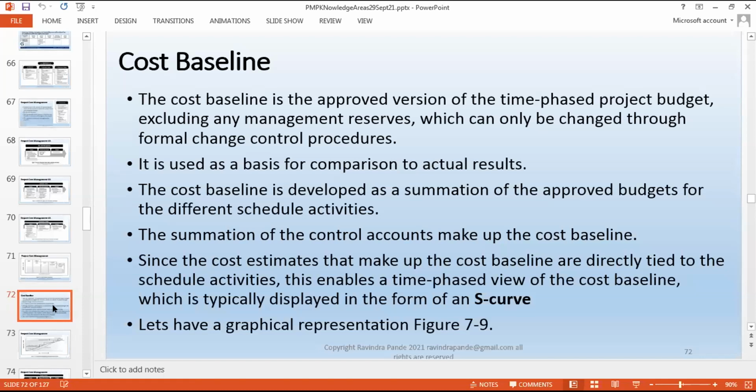Now here the approved budgets, they are talking about the control accounts. Control accounts are within the project manager's capacity. You as a project manager can use the activity or work item contingencies, but whenever you are hitting the control accounts, it means that the project is already in yellow. Now, whenever you go and ask about the other reserve, you are in danger, you are in red. So the organization is going to bleed on its profit. So we should stop this execution then, because businesses are there to build profit. If you're not building profit, there's no need of business. You should close the business down, right?